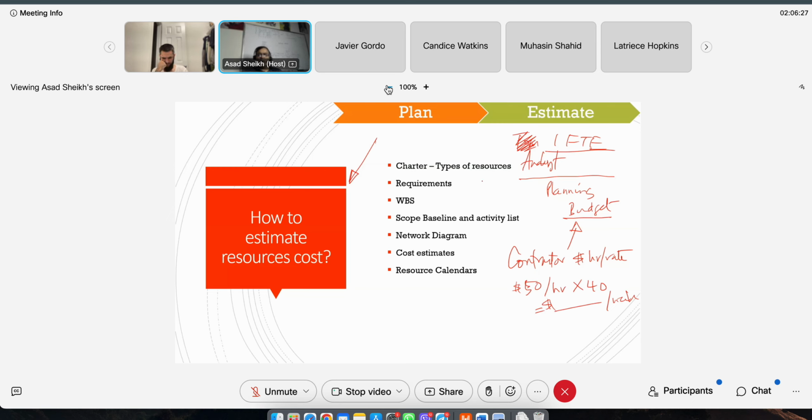So first of all, you would need to know who this person is, and if it's going to be an outside person, what the hourly rate is, and then you need to know how much time this person is going to take up on this project. Even though you said it's going to be one FTE, you don't know how long you're going to have him for: a month, 2 months, 3 months. And if it's 1 month, okay, it's just $2,000, let's say, per week. And then you say, okay, it's going to be 1 month, so that's $8,000.